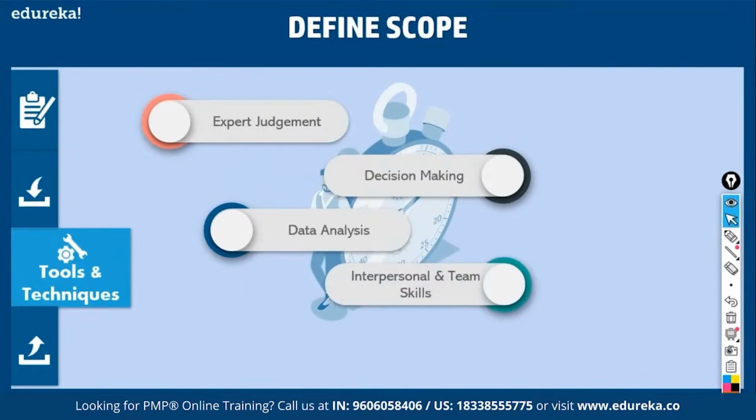So what is decision making? For example, if you have to select a product, how much importance should you give to a product feature? For example, you want to focus on looks of a product, then safety, then cost. How much importance should be given to looks 2x, safety 3x, cost 1x? So you can take decisions based on some sort of a matrix like this for a product.